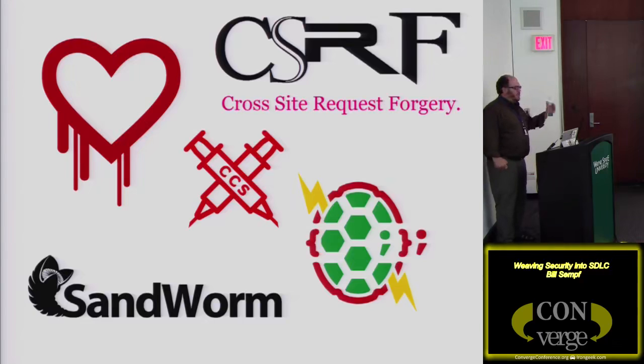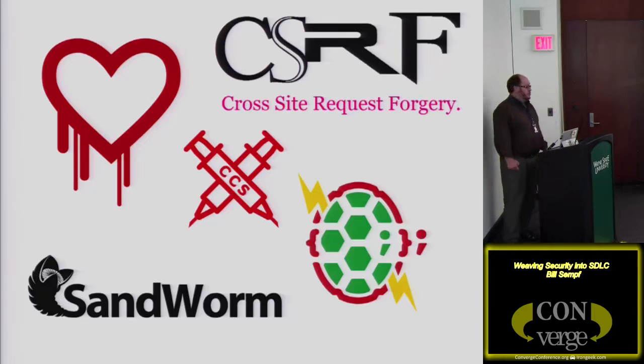So there was a logic flaw. Somebody didn't think to check, hey, if someone's looking at this quote, make sure they're actually allowed to look at that quote. That's a requirement, right? That flaw could have been found in a requirement, but now it's been found in production. So it's going to cost 23 times as much money to fix, as we've discovered with all these. I mean, some of these cost significantly more than 23 times as much to fix, am I right?